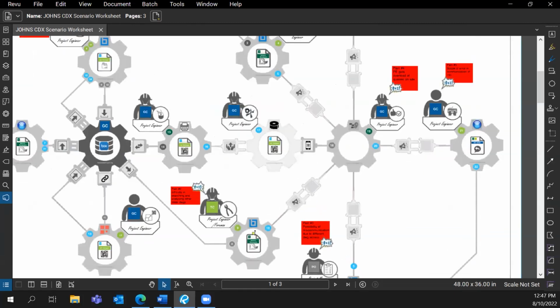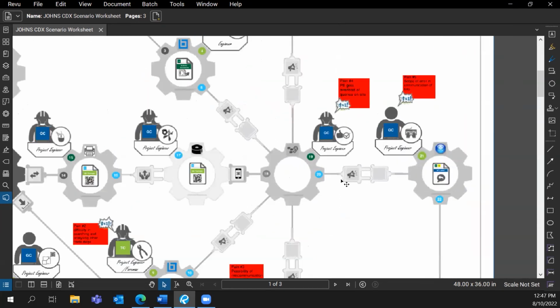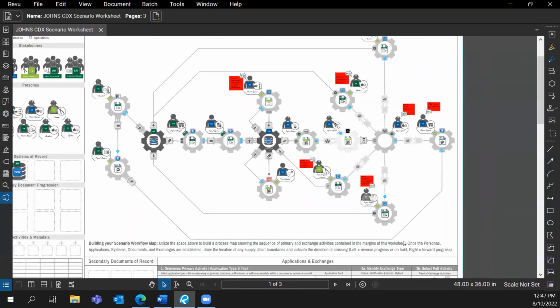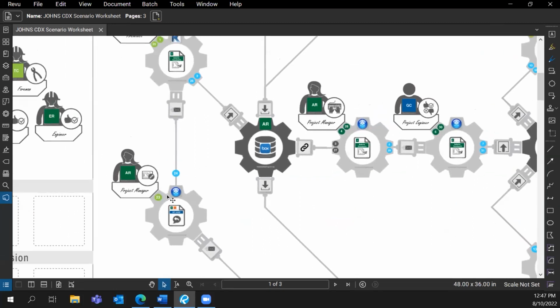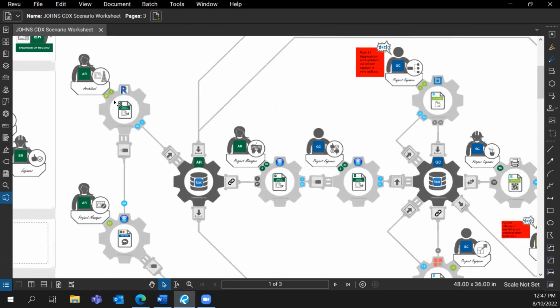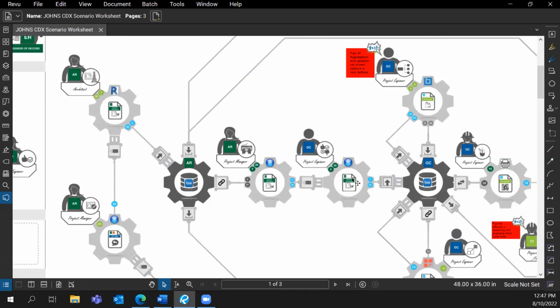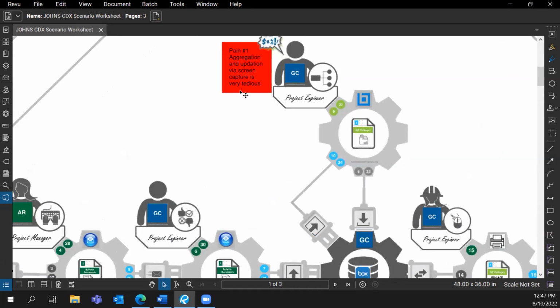Once they use it, they verbally communicate whatever issues or concerns they have to the project engineer, where you can see all these communications coming in. The project engineer then communicates this to the office project engineer, who writes an RFI and communicates it to the project manager of the architect. The project manager sends these requests to the architect, and the architect creates an updated bulletin document, which goes through the same process of sending the email. The GC gets it, the Box is updated, and then these quality check packages need to be updated again.